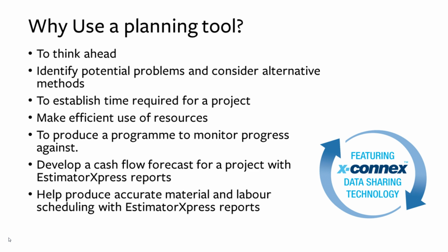With this as well, you can produce a program to monitor progress against. So you've got your phases as you're working for the project. If you're on schedule, nothing to worry about. If you start falling behind, then you can update your phases to today's date, pushing everything else along, seeing how it's affecting your baseline, and if it's going to impact upon your completion date.